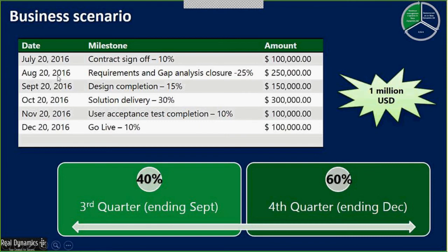On different dates, based on the different activities and the milestones being delivered and achieved, and the percentage agreed with the customer, an X percentage is charged to the customer. So that keeps ensuring that your accounts receivable is up to date.